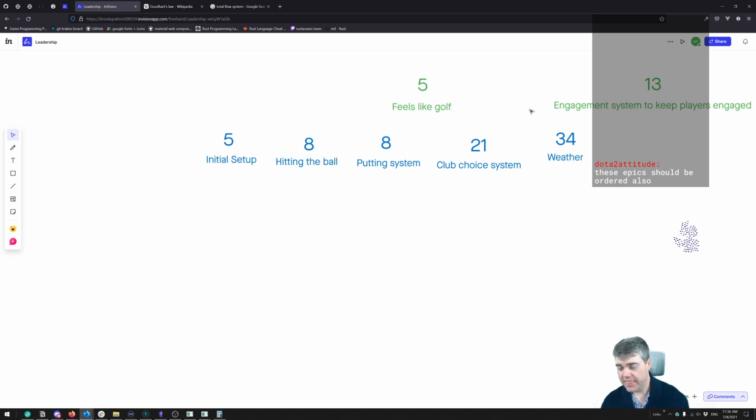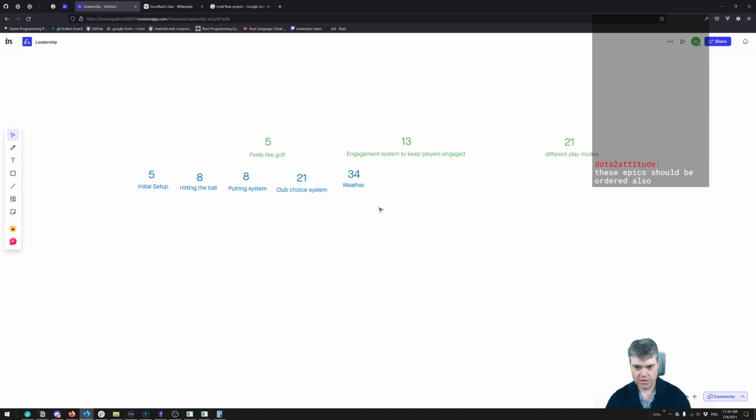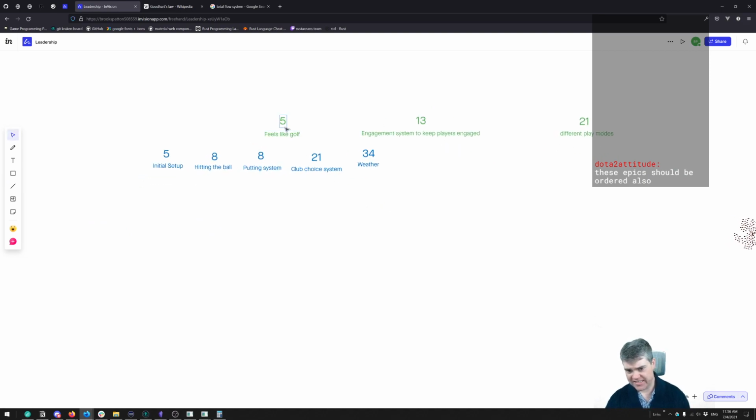Okay. Now, as soon as we get this, we can look at this and say, ooh, okay, so we have 5 and 13 is 18 plus 21 is 39. So we have 39 epic points total for this project.